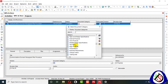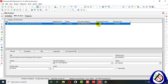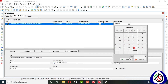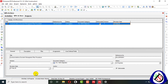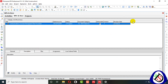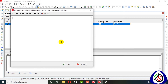I will assign this document as Non-Objection — this document has to be submitted for non-objection, so it is a deliverable. You can assign a revision date — 27 February, for example. In the bottom layout you can write the author name; Mr. John is making this document. You can add the column for author by right-clicking and going to column description. You can also add a description column — write what the document consists of.